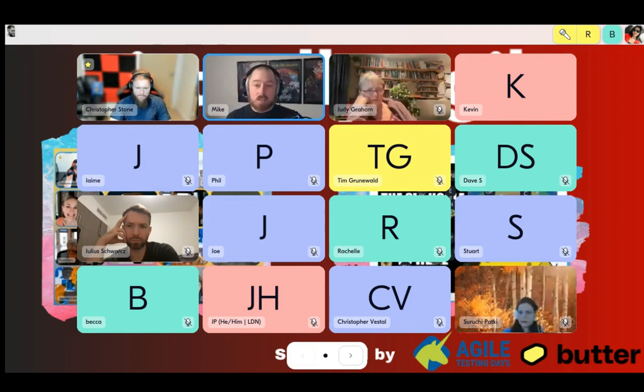And that's really what that step's there for, is to just make sure we spend that time thinking that through. And the trick that I often give, and I'll talk about this in the workshop, is you should be able to write a purpose statement that when you say it to someone who isn't a Scrum Master or Agile coach, they smile and nod and they say, yeah, I agree with that. That's the sign of a good purpose statement. If it sounds like something that only other Scrum Masters will agree with, then probably not, right?